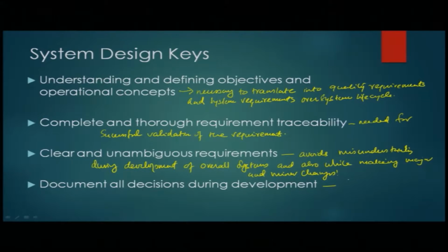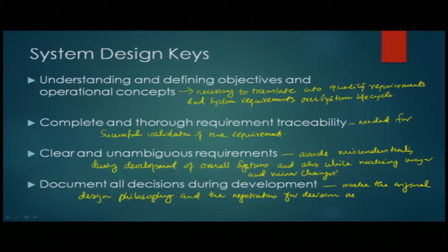Because it helps you to make the original design philosophy and the negotiations during the decision making available for future change assessments or system modifications.